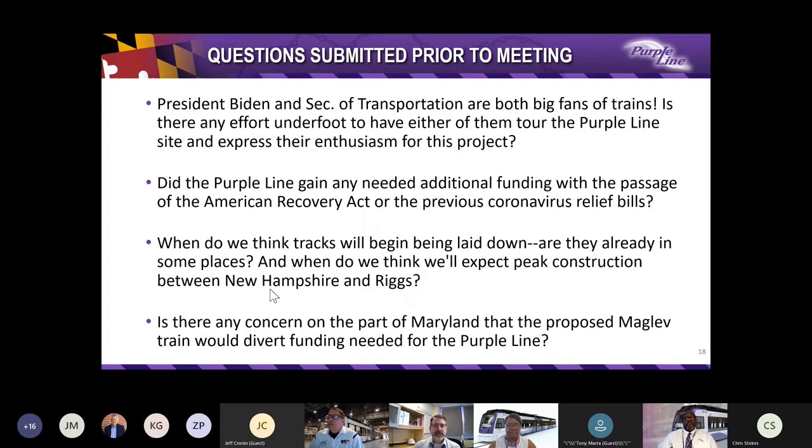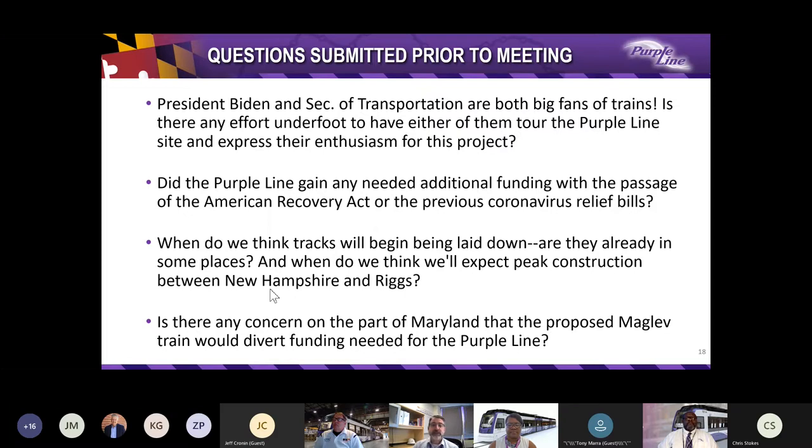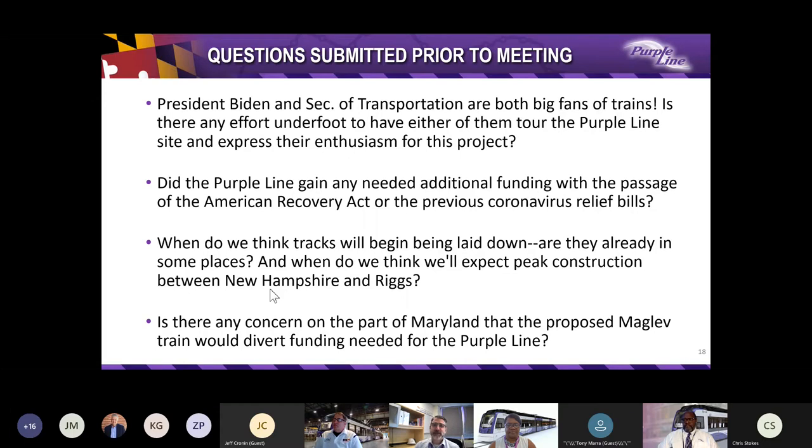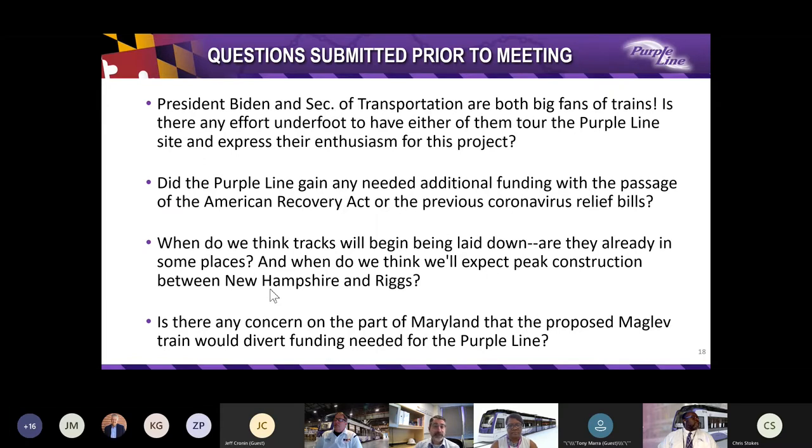Next question. When do we think tracks will begin being laid down? Are they already in some places? And when do we expect peak construction between New Hampshire Avenue and Riggs Road? Well, some tracks are already in place near the Glenridge Operations and Maintenance Facility and near the College Park Metro Station. The timetable for peak construction between New Hampshire Avenue and Riggs Road will be determined in coordination with the new design-built contractor who will be selected in the coming months. Next question. Is there any concern on the part of Maryland that the proposed maglev train would divert funding needed for the Purple Line? Well, actually there is not a concern on the part of Maryland that the proposed maglev train would divert funding needed for the Purple Line.